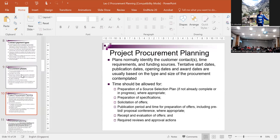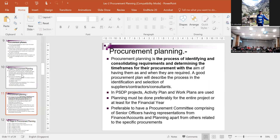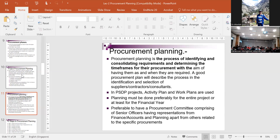Procurement planning is the process of identifying and consolidating requirements and determining time frames for their procurement, with the aim of having them when they are required. A good procurement plan describes the process for identification and selection of suppliers, contractors, and consultants. PSDP projects' activity plans and work plans are used. Planning must be done preferably for the entire project and at least for the financial year. It is preferable to have a procurement committee comprising senior officers with representation from finance, accounts, and planning, headed by an officer not below grade 19, preferably grade 20.